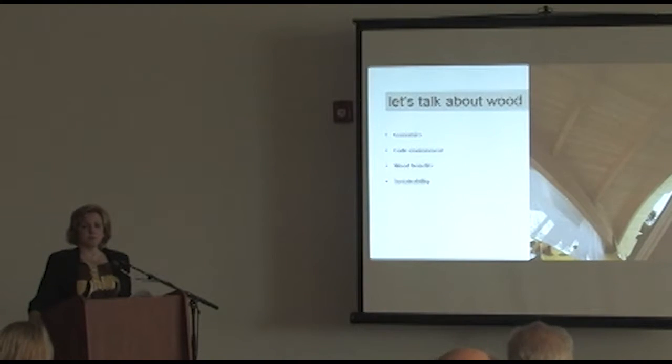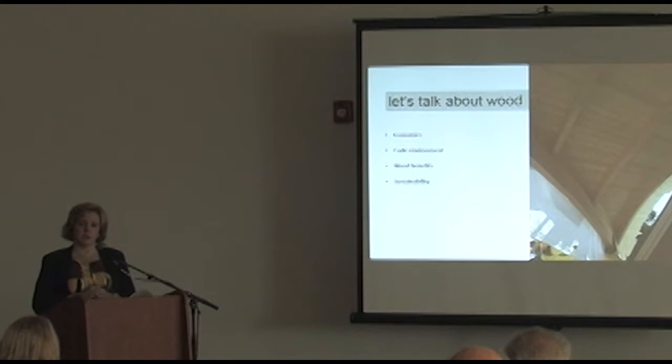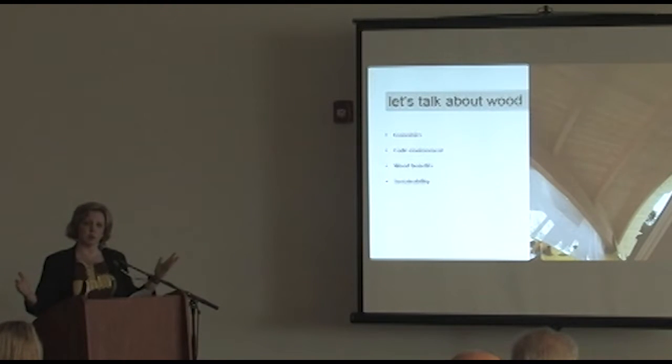So we had a scheme at risk, and we stopped and did an exercise. We took the developed drawings, how many people did we send it out to? They sent it out to three or four major companies that do this wood construction, and they got actual pricing back for the packages. And then we went to a meeting with a major steel fabricator. As we're talking through it, they revealed the numbers that we got from the wood companies. I don't remember the numbers, but they were not far apart. It was three or four, several, close together.